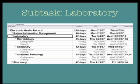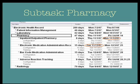For example, under the laboratory subtask, anatomic pathology cannot be implemented until after microbiology and chemistry are complete. Here is another example under the pharmacy subtask. Electronic medication administration record cannot be implemented until inpatient-outpatient pharmacy is complete. Thus, the project calls for the electronic medication administration record to start configuration process on November 13, 2007. This is 1 day after inpatient-outpatient pharmacy is scheduled for completion.